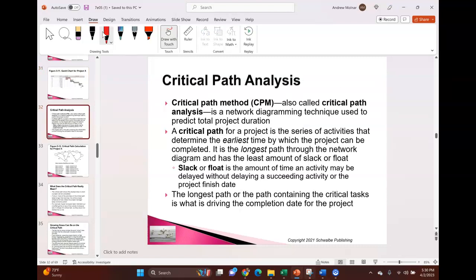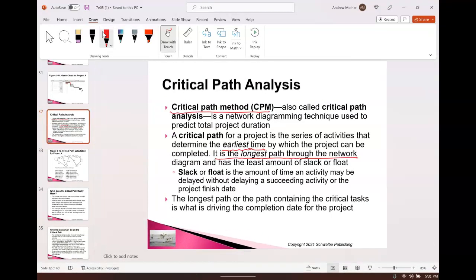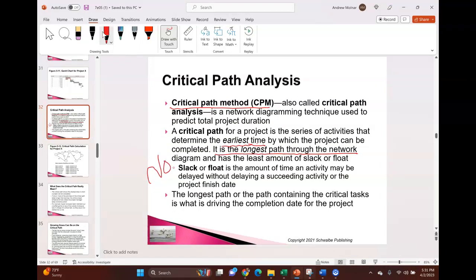On any schedule, we are always concerned with the critical path. The critical path is the earliest a project can finish, meaning it is the longest path through the network. There is no float or slack — no extra time — on the critical path. Many activities can be important without being on the critical path; what makes a path critical is simply that its duration has no buffer. If any activity on it delays, your whole schedule delays. The critical path is the longest path in the network and also the shortest time the project can be completed.